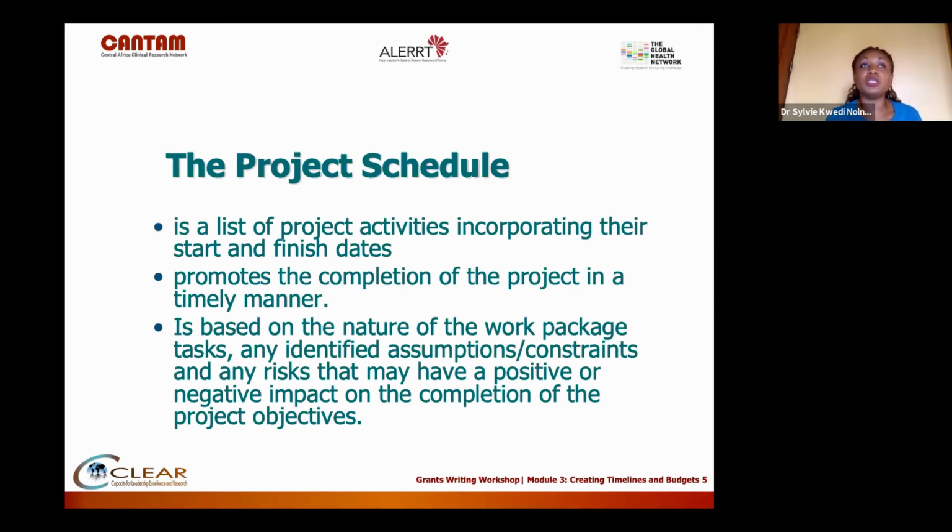The country guidelines are to have national ethics review of all research projects, and also administrative authorization from the Ministry of Health. The National Ethics Committee meets every 2 months. Those are constraints that you have to take into consideration when putting together your timelines.